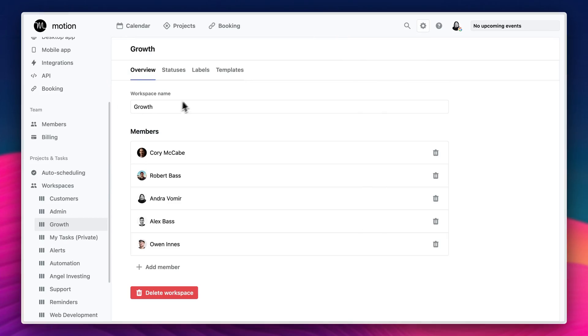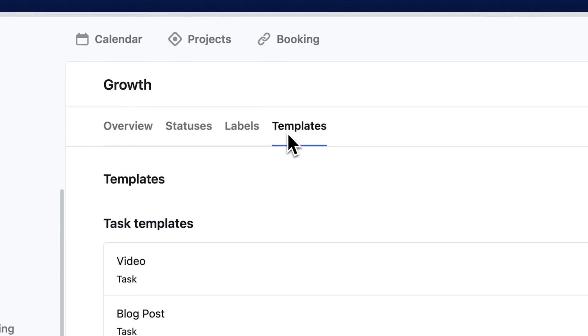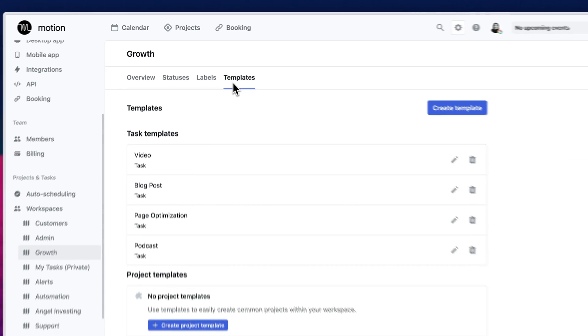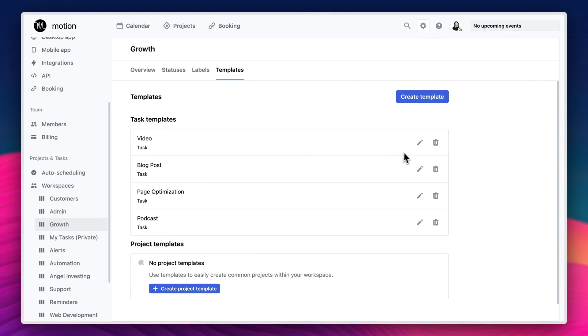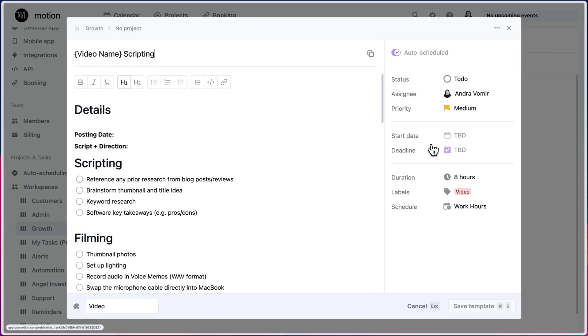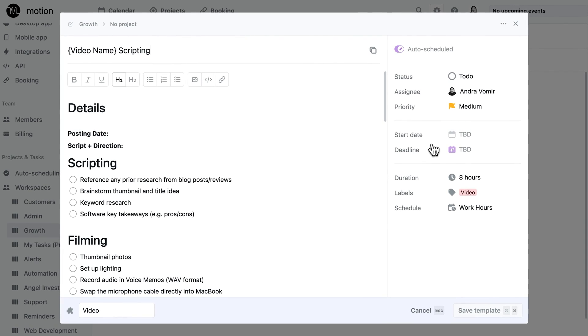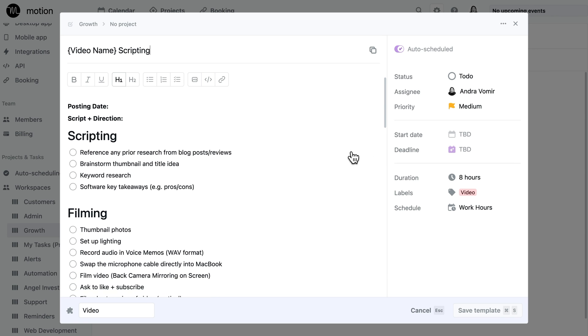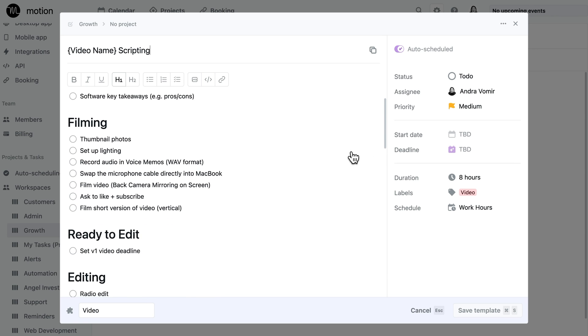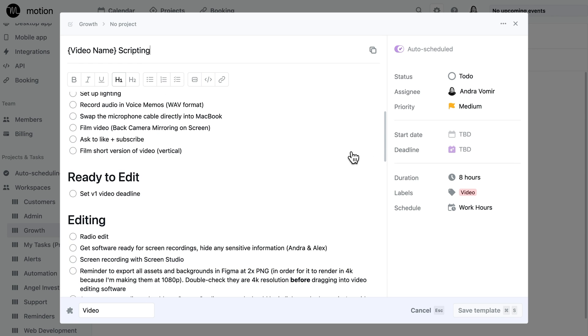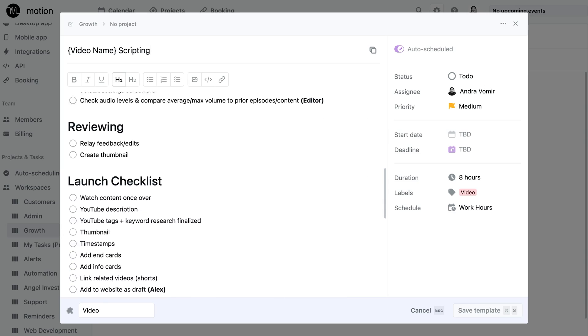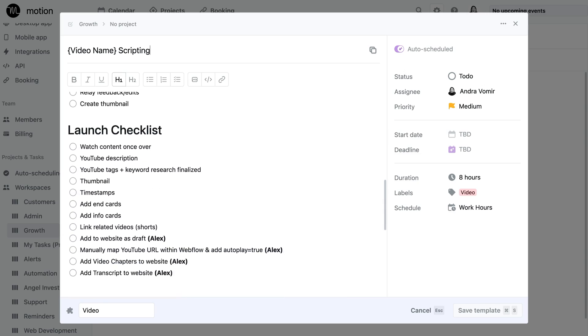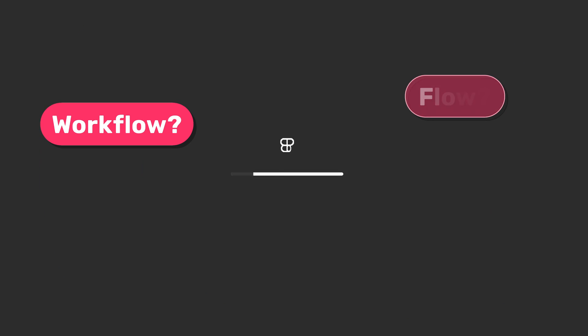Speaking of tasks, you can also create reusable task and project templates for each workspace. For example, we have templates for new videos and blog posts and it allows us to quickly create a more structured task that has pre-written details and subtasks outlined for each status that the task moves through. It's almost as if task templates allow you to create a structured process or workflow to move projects through. Wait a minute, workflow, flow, Figma files.